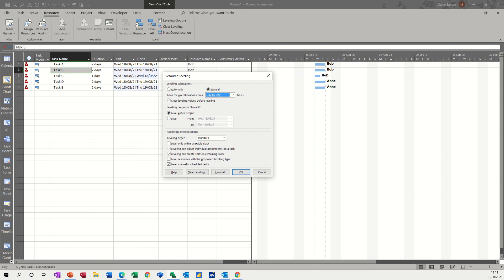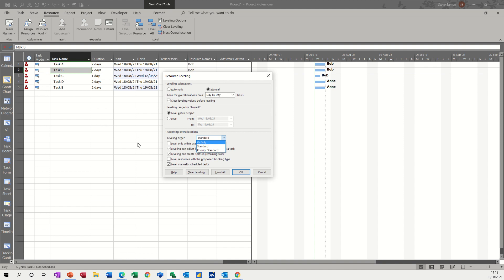And then you have this standard feature. So standard is the default. So that will look at predecessor dependencies, any slack dates, priorities that are set and any constraints that there might be on a task. So if you didn't want it to do in that order, you could force the ID to go first, which is basically this one, two, three, four, five. Look at those. That's the order it will do it.